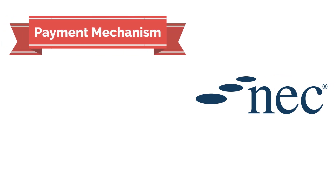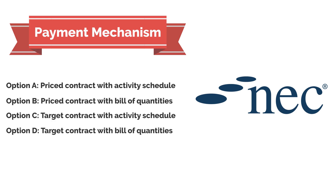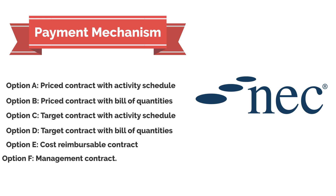The NEC suite of contracts allows for flexibility in selecting the preferred payment mechanism. This is dealt with under the main option clauses, which include: Option A, price contract with activity schedule; Option B, price contract with bill of quantities; Option C, target contract with activity schedule; Option D, target contract with bill of quantities; Option E, cost reimbursable contract; Option F, management contract; and Option G, term contract.